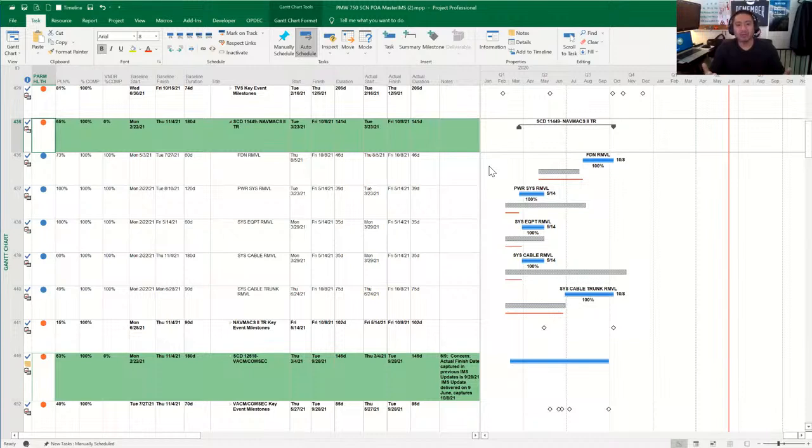like a bank account. You're negative. You're using your overdraft, saying that you're over negative $100, and you're waiting for your next paycheck to hit so it can clear. So the critical negative float is used to help in trying to get the schedule back on track. There are more methods than just putting up the slack and the float and showing the tick mark on here. It will have a bar with a purple color.